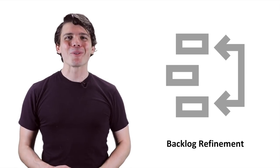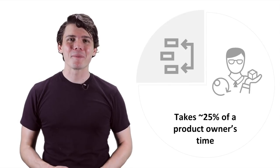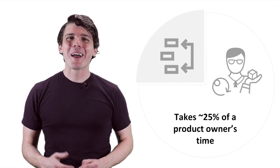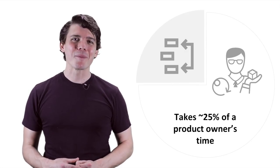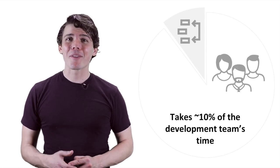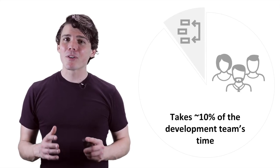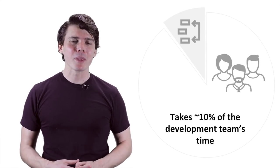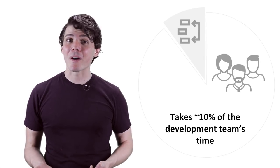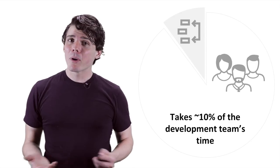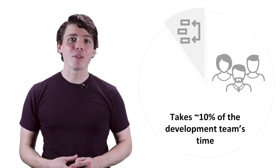Backlog Refinement is the work of refining, estimating, and ordering items in the product backlog. As a product manager, I used to spend about a quarter of my time working on my backlog. The Scrum Guide suggests that the development team also spend up to 10% of their capacity supporting backlog refinement. This usually happens in regularly scheduled events such as backlog refinement and sprint planning, but it also occurs ad hoc, such as in a parking lot discussion after the daily scrum.